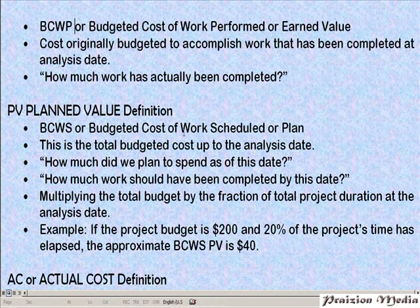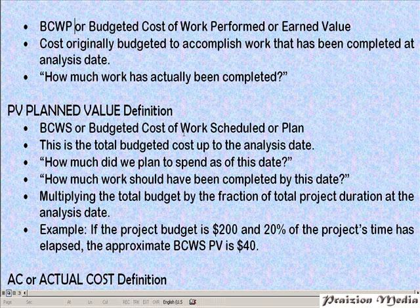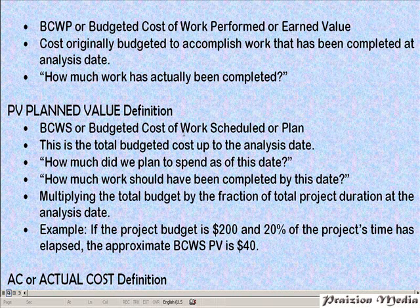What is Planned Value? Planned Value is also known as the budgeted cost of work scheduled. This is the total budgeted cost up to the analysis date. It answers the question: how much did we plan to spend as of this date? How much work should have been completed by this date? In our example, the planned value is actually $20, because at the end of two hours, I had planned that I would have done $20 worth of work. So the planned value in that scenario is how much work should have been completed by this time — $20.